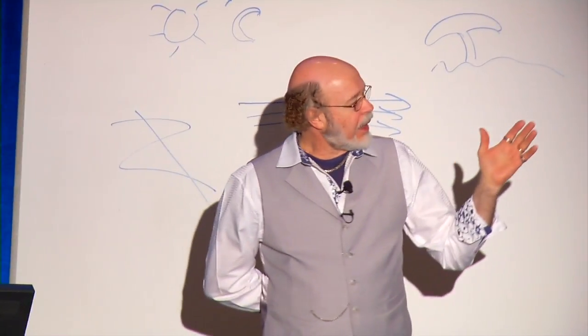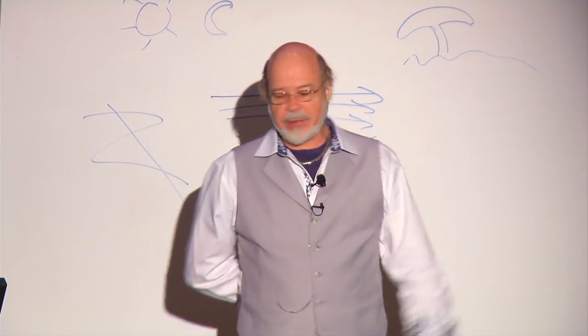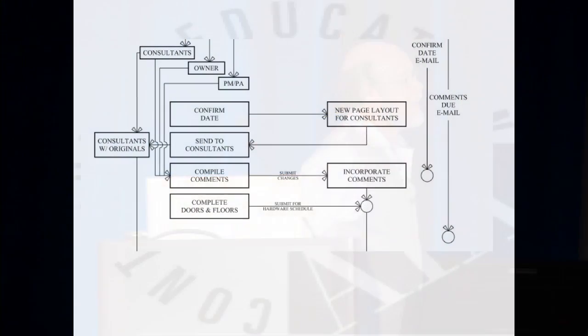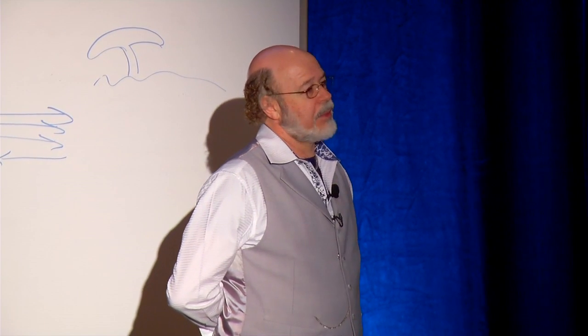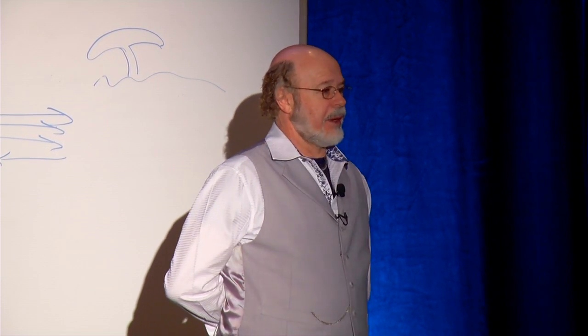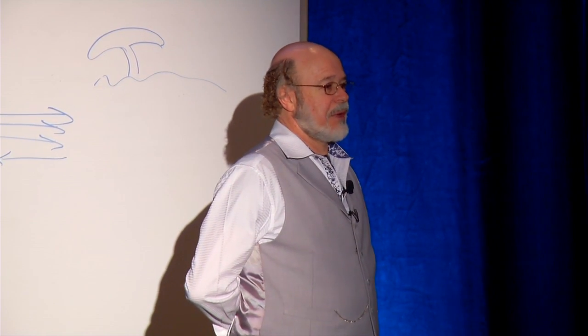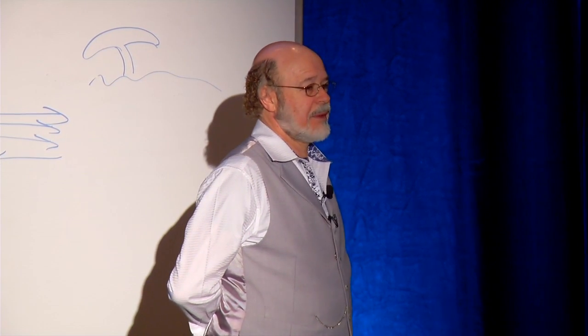So anyway, the reviewers have the draft, everything is supposedly good, we're all going along happy, and then we create this new schedule. Everything has gone back out to the consultants, we're going to confirm the final date, and new page layouts get the actual final date in it. I always print out or send PDFs of the draft that actually say draft instead of a date on it, so I don't date any document that's not official. Just my own personal habit, but it lets everybody know that if you come to a meeting and you've got a book that says draft on it, you're probably not well informed.